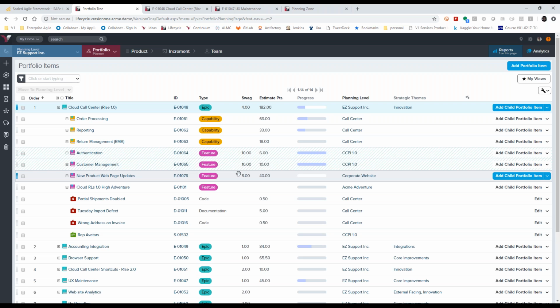Okay, the next one is, story points can vary among teams. How do you manage that? Yes, story points can vary among teams. Again, SAFe has a concept around story point normalization. At the end of the day, version 1 accepts numerical values in terms of calculating. I think most teams today that are adopting estimation practices vary widely in what they score as a 2 versus a 3. So version 1 doesn't directly address that